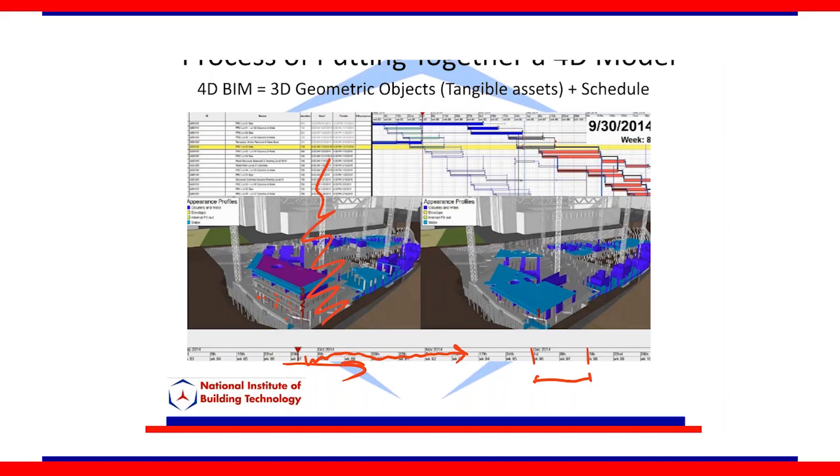So if you're just installing doors, you can call the door manufacturer, you can call the door installer and say, this is how we plan to build it. Here, this is where you will stock, this is where you will install, and you understand how many people you need to move it, how many crews you might need. It gives that visual representation for people to plan. Okay, we're trying to install doors in two different sectors of the building, so I might need two crews because it looks like we're running parallel.